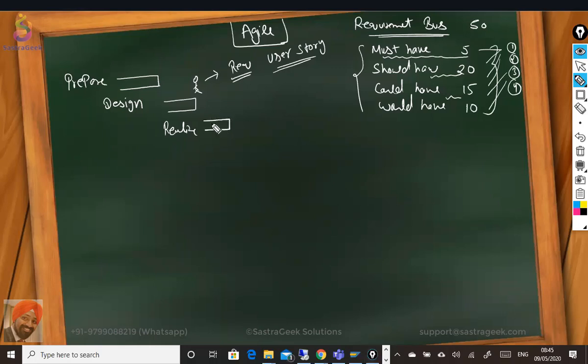You can have a first sprint, sprint 1. In this first sprint, you can do the basic config. And within the sprint, the length of the sprint can be as small as a week to a couple of weeks, or maximum 3 weeks. Okay, so you can do the business configuration, and you need to do multiple demos. Every week you need to do at least 2 demos with the business.